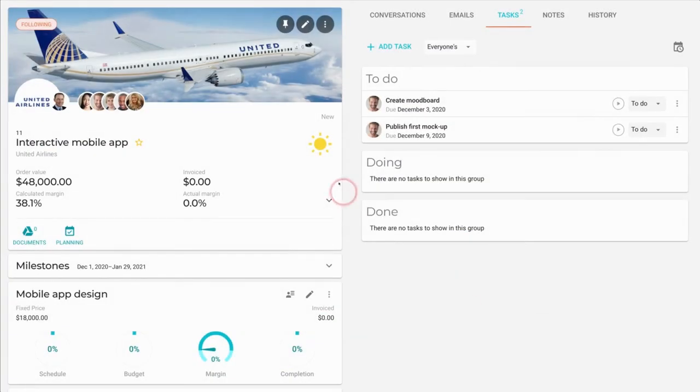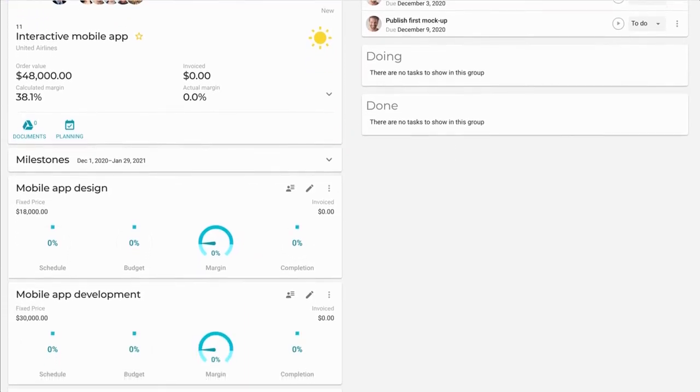Here's a project page in VOGSY, exactly the same as the previous image, right? In fact, all of the components of the work breakdown structure are present in this project page. However, things are structured a bit differently in order to take advantage of VOGSY's visual and interactive nature. Let's go through the project page and see if we can find all of the components of a work breakdown structure. There's the title of the project, and then there are the Level 2 phases. In VOGSY, we call these phases deliverables.